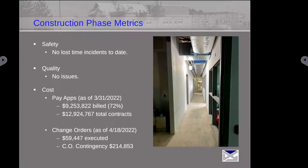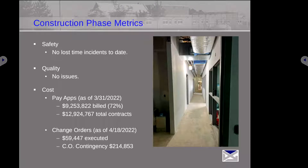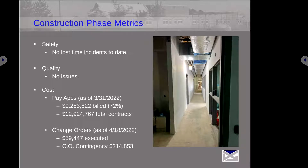Jumping to this one — we've had no incidents on this project, no issues for quality. As of the month of March, there was just over 9 million billed for the whole project for all the contractors. And then there's a new revised contract amount, as of the end of March, just under 13 million, with some of the changes we've been implementing.